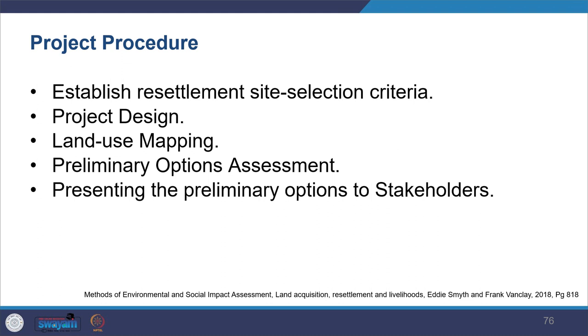And then you also look into the site selection for resettlement. It's a very important task and can have major ongoing social impact for the resettled people. So where do you really locate them? That has to be seen well, and does it really help them to reestablish their life? And you need to establish resettlement site selection criteria: on what basis you're going to select a site. So you need to develop those parameters.